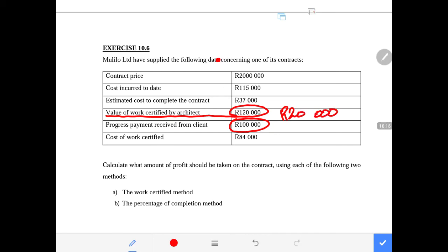Whenever you ask a person to do a job for you, for example tiling in your house, you don't pay them the full amount when they are not done with the work. If the person has done 20% of the work, you give them payment for that, and in that amount you also keep part of it.